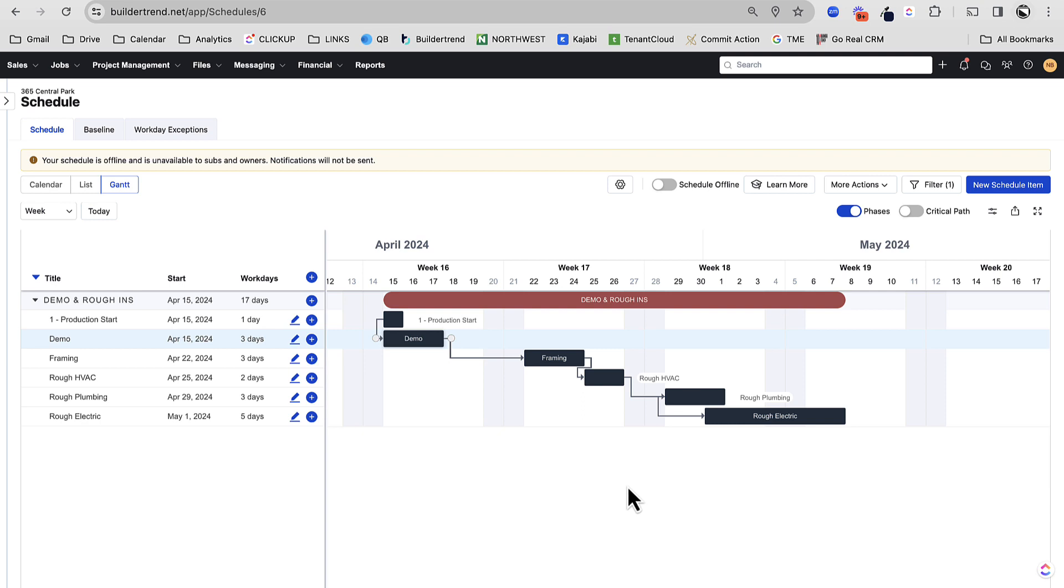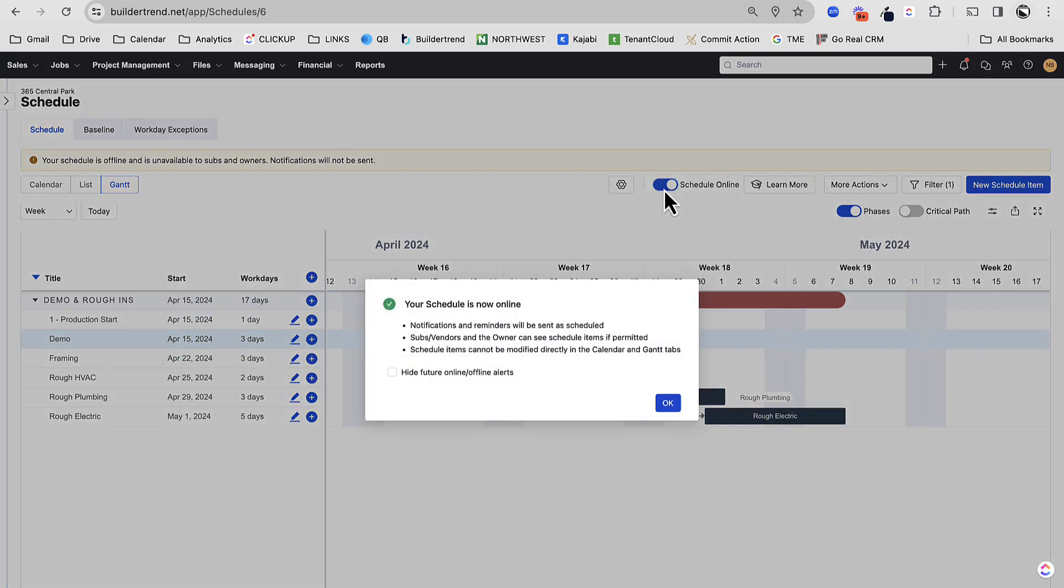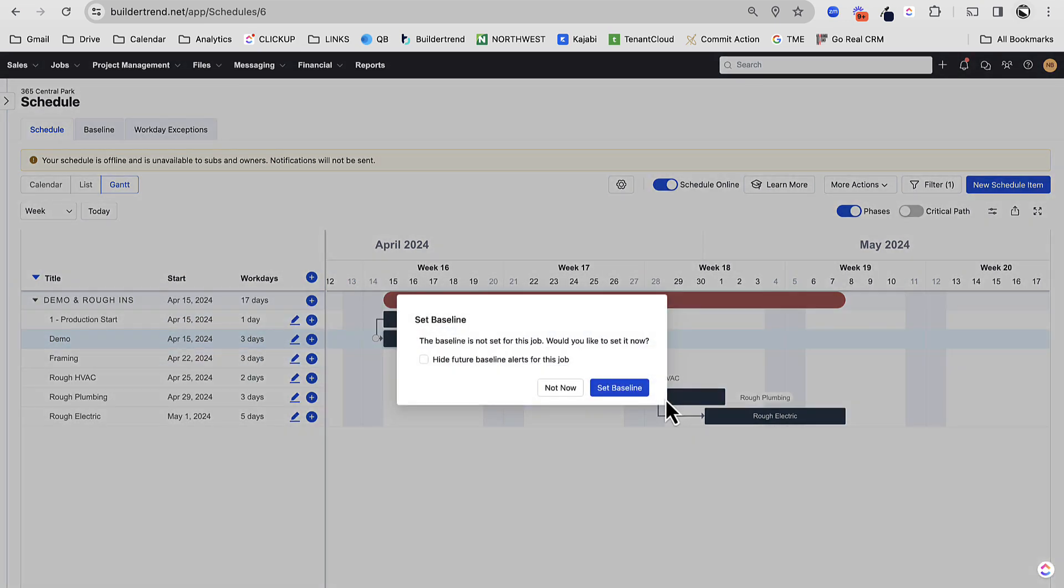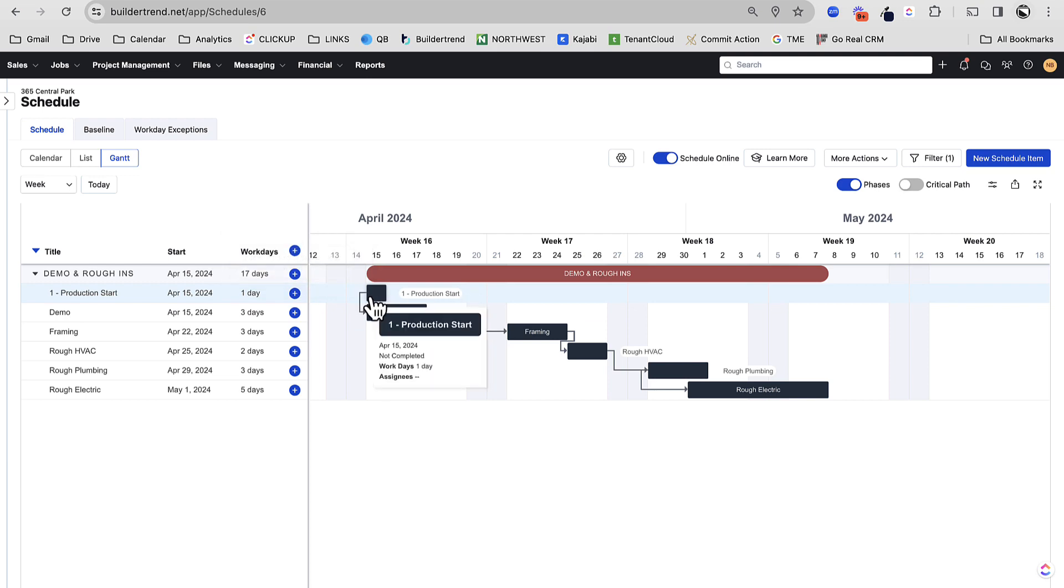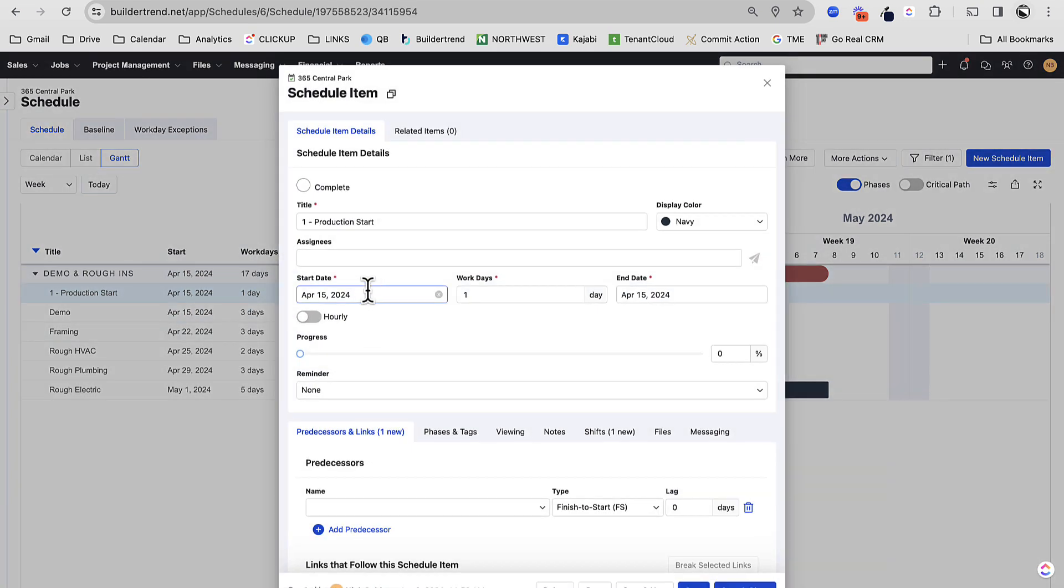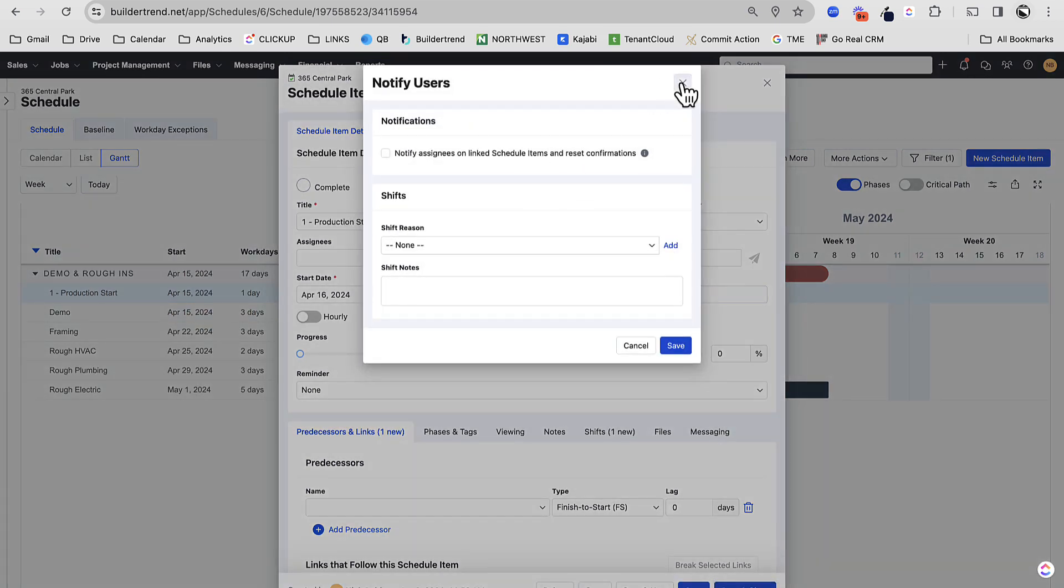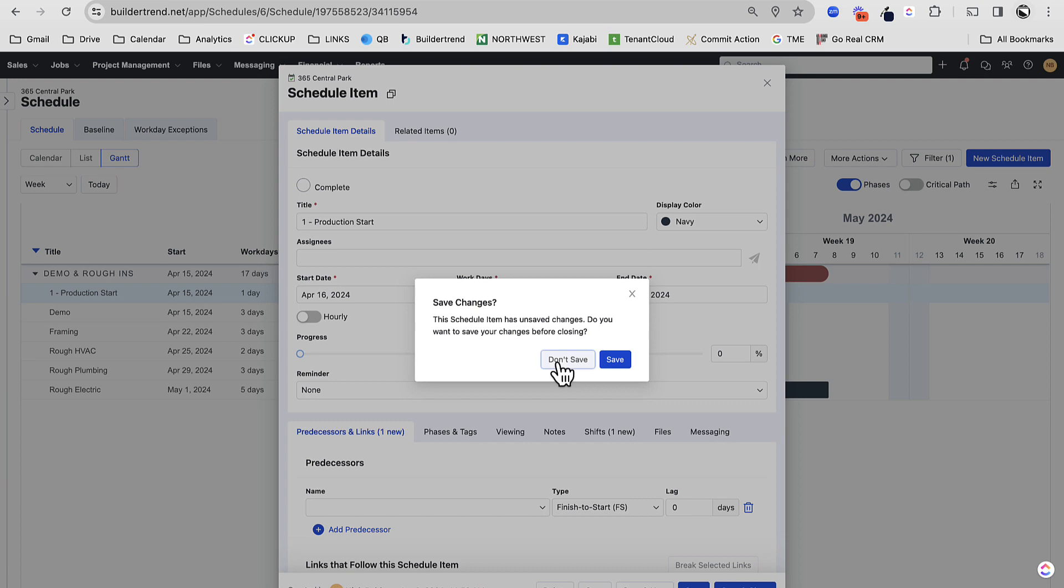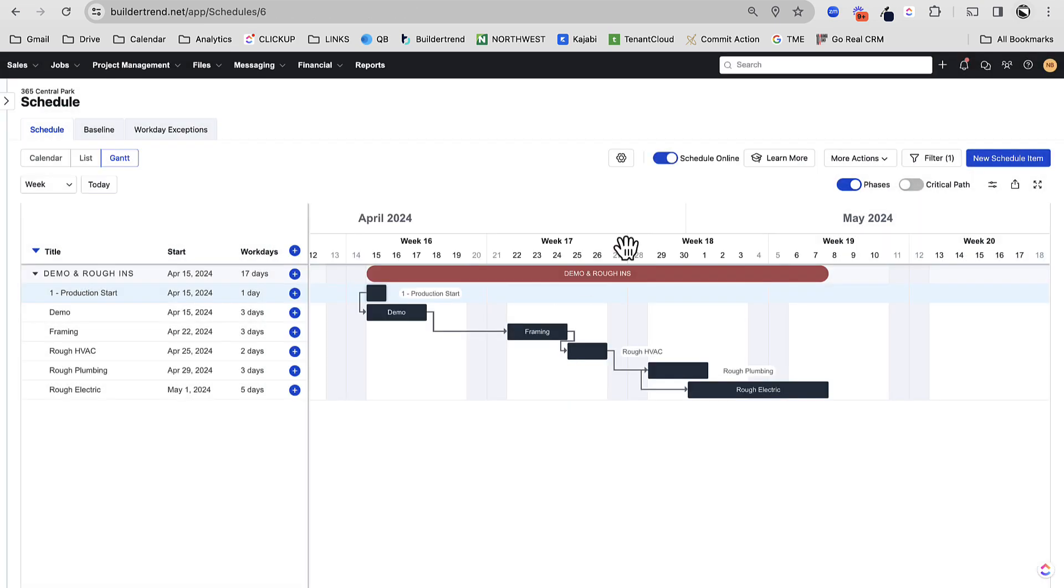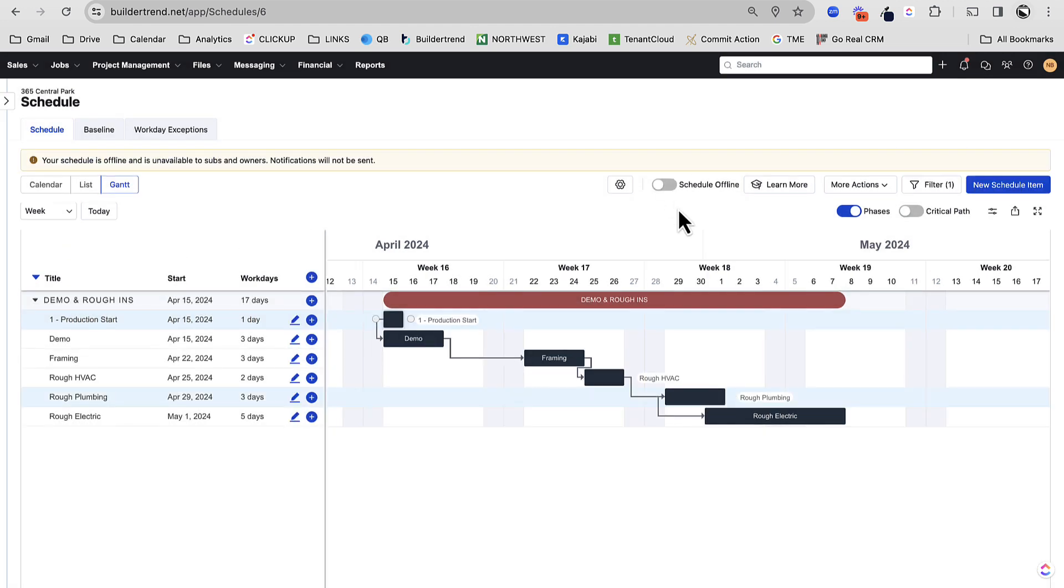All right. So we're starting to build out our schedule and things are starting to look pretty good. Now, just a few other items on how we can view the schedule and some admin on this. So right now I'm in offline mode and I encourage you that whenever you're building a schedule or doing mass edits to a schedule, stay in offline mode. The reason is that if I'm on online mode, whenever I move an item, I can't click and drag it for one. So that's kind of a problem. And then if I were to move an item, it's going to ask if I want to notify people or if I want to record shifts. So if we're doing a lot of stuff, it's going to ask us that way too much and it's going to become annoying and really tedious. So whenever we're doing a lot of work, let's turn the schedule offline. And now I can click and drag this one task, move it. It's going to move the whole schedule.